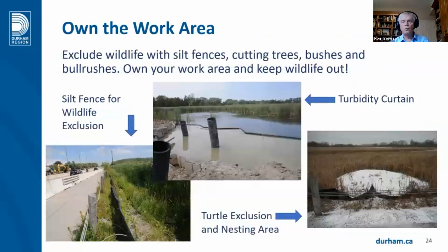So when I started the design for this project, I quickly found out that the wildlife windows left 2 weeks of construction a year. This really concerned me at first until I started looking at how to exclude the wildlife from the work area. Own the work area. I can't say that enough.